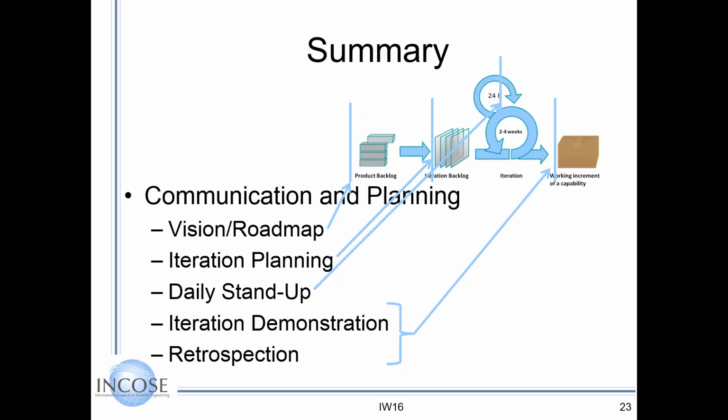Essentially, the concept is that within your iteration, you're not just developing code, you're also analyzing requirements, performing detailed design, developing code, running the tests, and doing your traceability, so that you've got traceability every iteration to the code you just wrote. That drives quality into your product every iteration. We were doing that on one project.